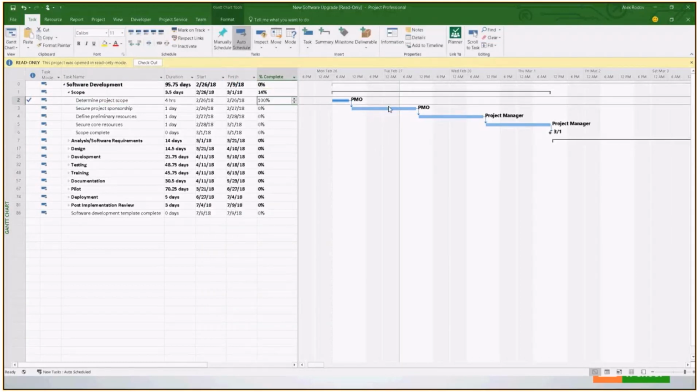I have this particular task, number 3, which has remaining work that is incomplete. So what I need to do is push this forward and reschedule the remaining work, which means that if I don't do that, it creates what I would call unaccounted debt of the resource.